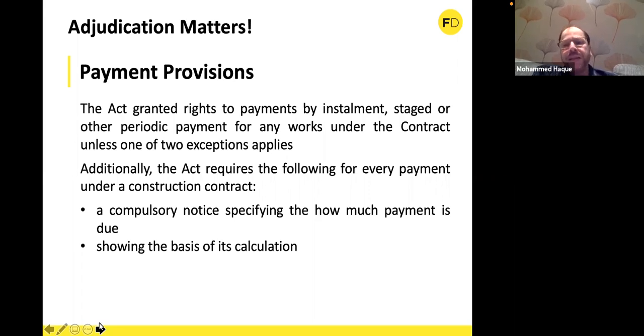it creates problems. Then the next thing to think of is, of course, in interim payments and in the final payments, the instructions of changes, either through compensation events if it's an NEC, or, I think FIDIC used to call it an engineer's certificate, or if it's a JCT, through a change instruction by the contract administrator, architect, or employer's agent. And then, of course, a completed valuation, agreed basis or whatever basis you have for a valuation there. So whatever for the month falls due on those counts, these are all under every payment.